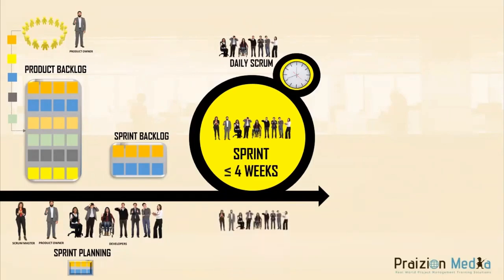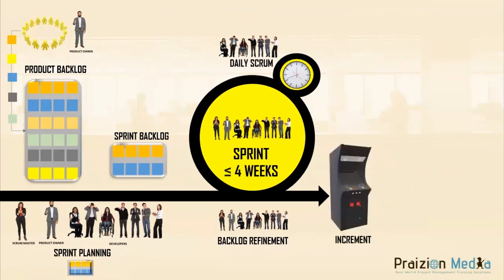The next thing that happens — an optional one — is backlog refinement. This is where the product owner works with the team to get user stories ready for the next sprint in whatever format works for you. The next thing is we get the increment, also known as a potentially shippable increment. This means we could ship it if it's featured enough, but not every increment is featured enough — we may need a number of increments to get a release, and we could have several increments in a single sprint.